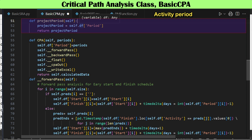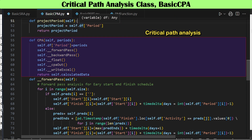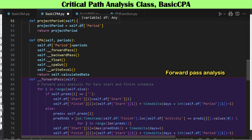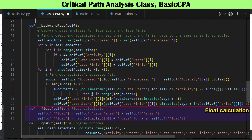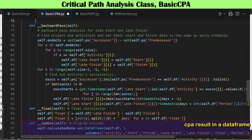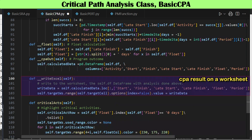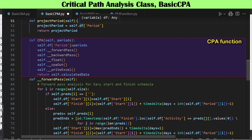It is necessary to extract project period data from schedule input data in the BasicCPA class, implemented at the function level so it can be overridden by subclasses such as PERT and schedule risk analysis. The returned period data are passed to the critical path analysis, primarily consisting of forward path and backward path analysis. Forward path analysis produces the logical early schedule starting from the project start activity; backward path analysis produces the logical late schedule starting from the project end activity. Each activity's slack is calculated from the early and late schedules, and the result — early schedule, late schedule, and slack — is stored in a data frame and returned. Five functions are encapsulated in a function named CPA.